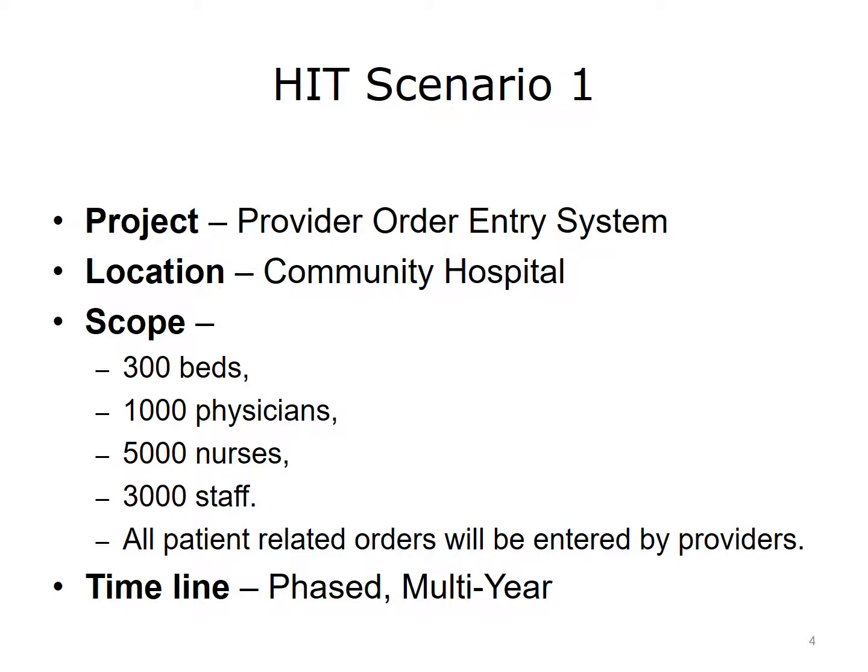A CPOE project would be considered critical because it directly impacts the patient care experience. It is clearly complex as well because of all of the stakeholders and participants involved. In this case, project implementation is complicated by the specific environment. For instance, because this scenario takes place at an independent community hospital, there probably aren't personnel to process orders at night. The hospital will have outside vendors or providers handling those orders, and the project manager will need to ensure buy-in from these providers.